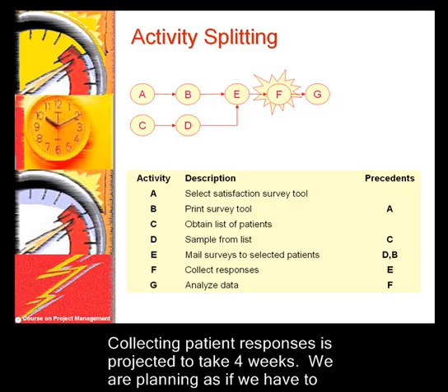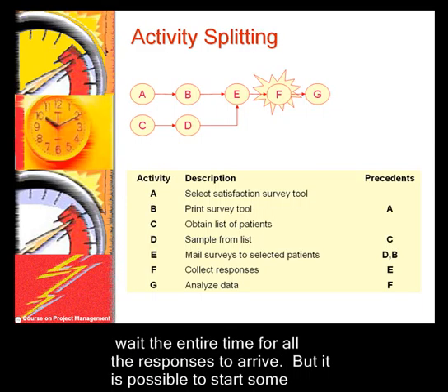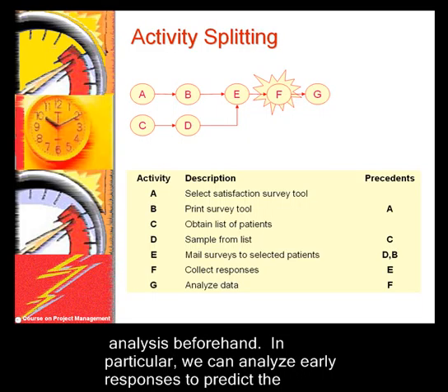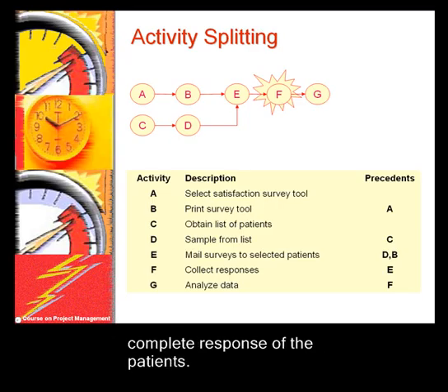Collecting patient responses is projected to take 4 weeks. We are planning as if we have to wait the entire time for all the responses to arrive, but it's possible to start some analysis beforehand. In particular, we can analyze early responses to predict the complete response of the patients.